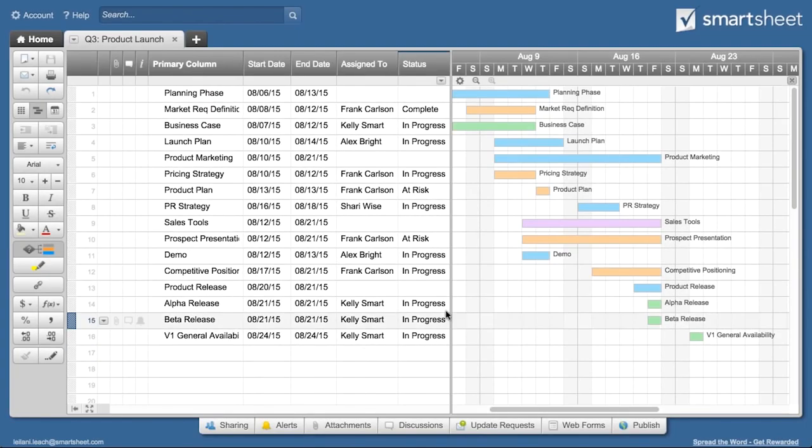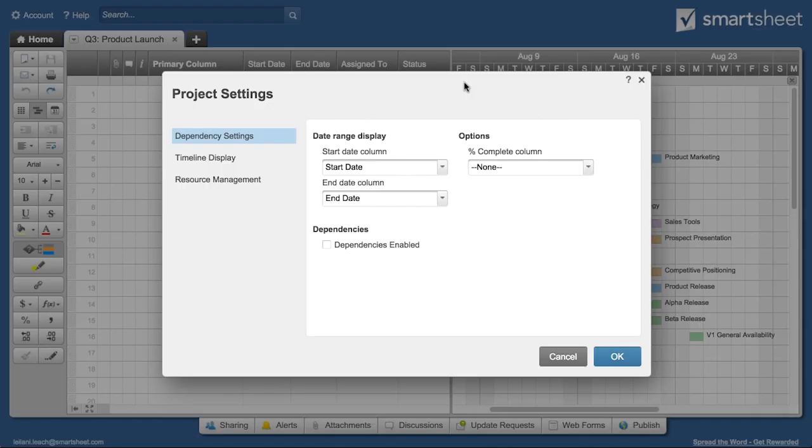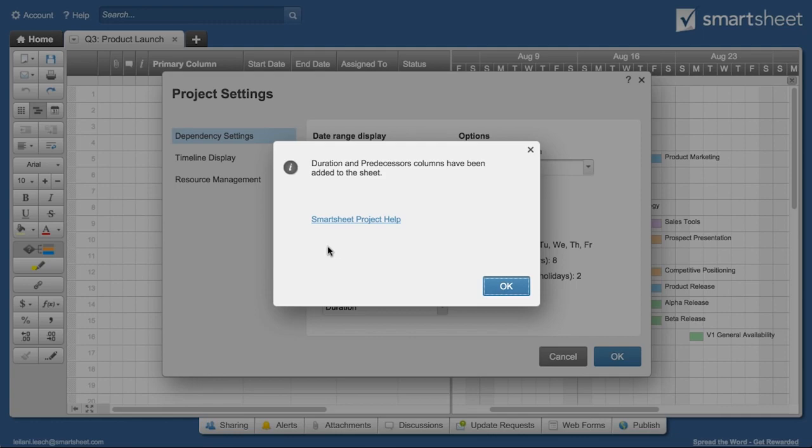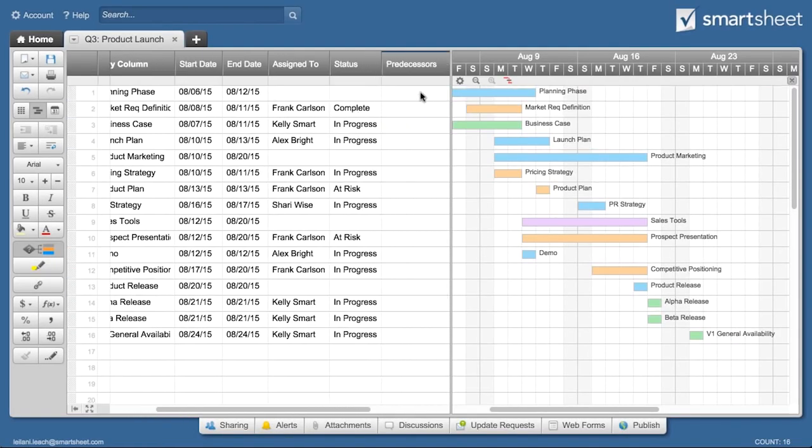Let's add dependencies to a simple Gantt timeline for an upcoming product launch. Click on Edit Project Settings to enable dependencies. Smartsheet will then create duration and predecessor columns for you.